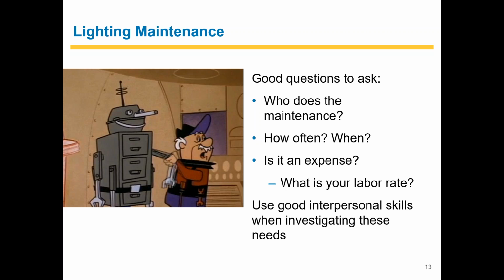If it's an on-call maintenance, they call and they make a maintenance appointment. Whereas if the customer has a maintenance contract where it's just a fixed annual cost, there might not actually be a financial benefit to improving maintenance without renegotiating that contract. So keeping these things in mind allows you to ask the follow-up questions necessary to provide some accurate costing information, and making sure that when you move forward, you're appropriately attributing those savings.